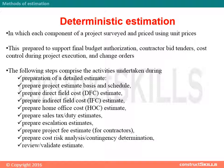Deterministic Estimation, in which each component of a project is surveyed and priced using unit prices. This is prepared to support final budget authorization, contractor bid tenders, cost control during project execution, and change orders.